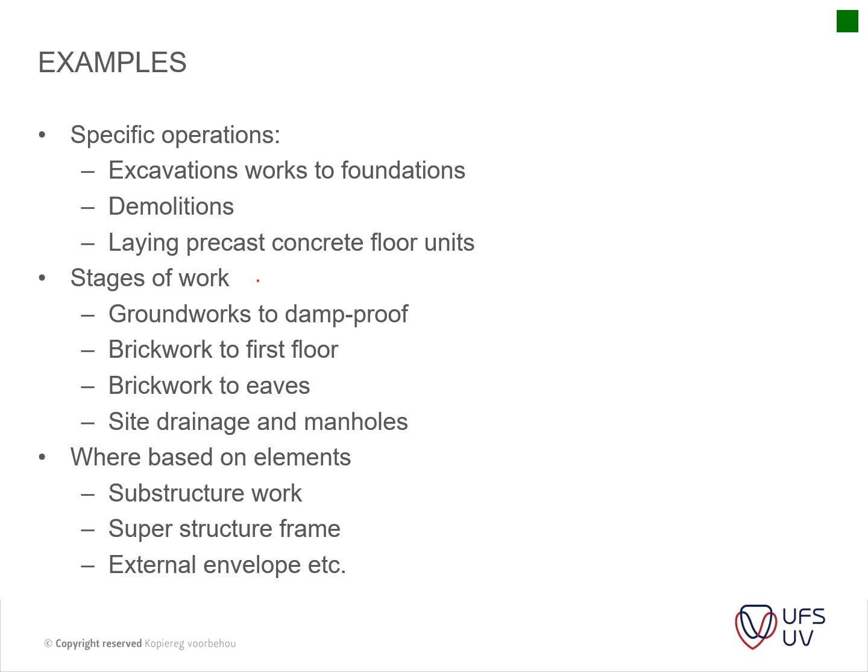method statements. And then we're based on elements. You can have your substructure work, superstructure, external envelope. You can structure your method statements in any of these three ways, but it's just to keep a logical flow of it. What the guys usually do, what I've seen and what I usually ask for, is on your program, do your method statements in accordance to your program. So for instance, your excavations or your site clearance, start with your site clearance method statements first, and your excavations first, and so on. Okay.